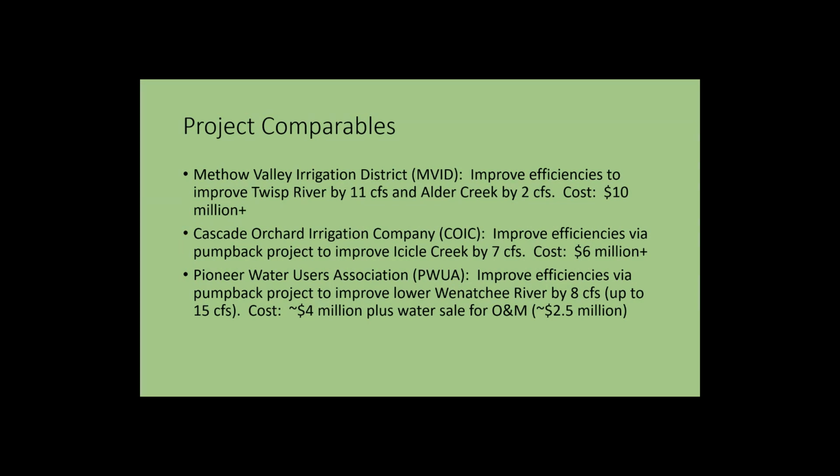So yep. Thanks. I would say, John, one direct comp I have is that we did an estimate on what it would cost to install, I think it was 18 or 24 inch pipe in the upper 4.5 miles of the Wenatchee Chihuahua Canal. And in today's prices, it was over $7 million, something like $6-7 million to do that. And the water savings is the same as what we're proposing in the water acquisition, right? So it's not completely apples to apples, but it's pretty